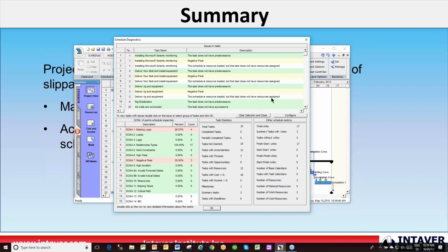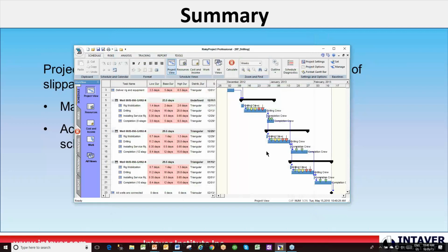this is not a requirement, but you do have to have a schedule with logic that can be updated and doesn't have circular logic. Those are really the two main things. But if you want to make sure that you have enough, and also I should say constraints. We want to have soft constraints as much as possible, because fixed constraints will artificially fix activity durations.